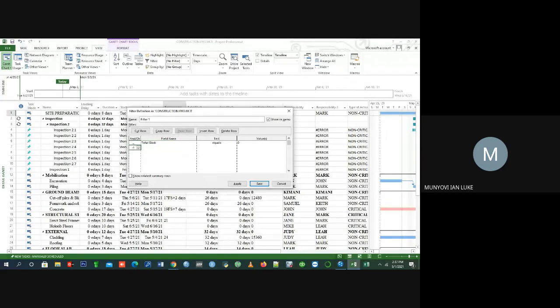Good. So if you click there, this is how you can combine a condition. Do you want to say total slack equals to 0 and? So immediately using the function and, it means you're making both of those conditions mandatory. If you're using or, it means either of those conditions will be selected.